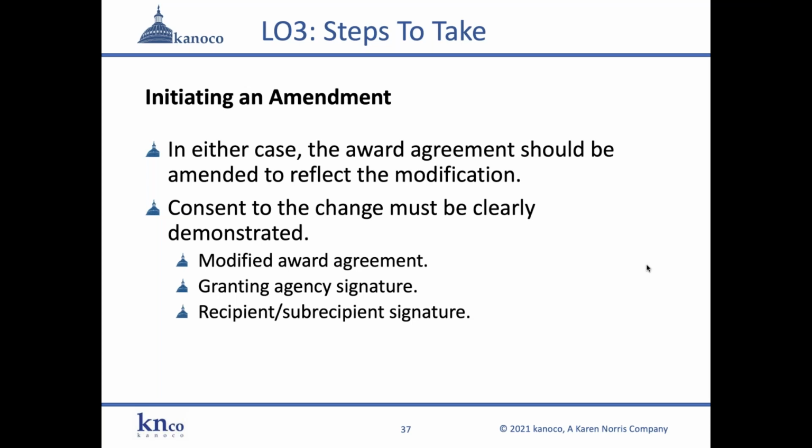clearly demonstrated. Again, modified award agreement, and I've said this maybe 4 times already on different slides, because the funding agencies often forget to amend the award agreement, and then people are caught unawares, or they're caught in an unhappy circumstance during an audit when an auditor is looking at the award agreement and they're looking at the original award agreement, which does not reflect the change. So the consent to the change must be clearly demonstrated because of the legal obligations that surround this process.